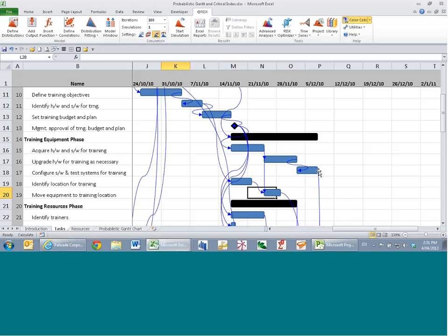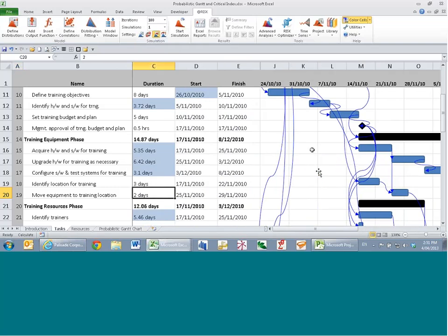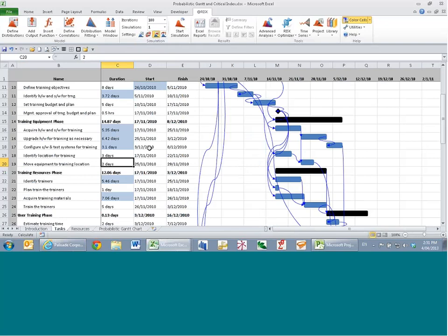So this can be a very big change to the way we think about our scheduling, but it is absolutely realistic. In the simplest of schedules, where every task is finish to start, obviously they all lie on the critical path. Another simple structure might be a collection of big tasks and a few little ones that never have the ability to push back the finish date at all. However, that's not the case in general for most projects. There will be a chance that various tasks will or won't be on the critical path, and we'd like to know what that chance is.